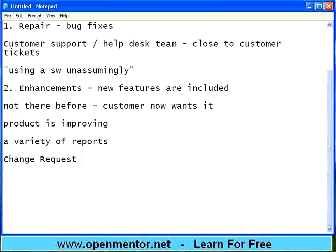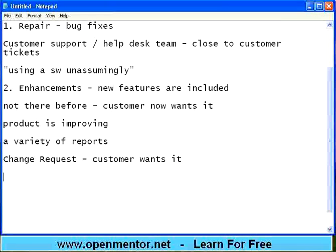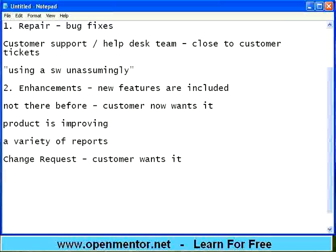A change request means the customer wants it. A new enhancement will always go through a small amount of design, coding, unit testing, integration testing, and system testing. It may be only one or two features, but it goes through the SDLC cycle in a shorter way. That's the second thing that happens.